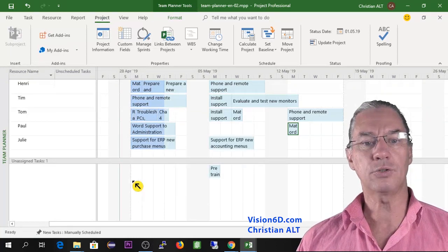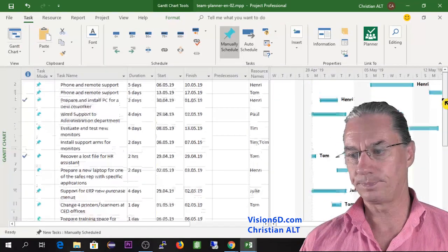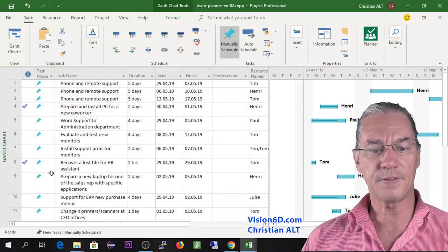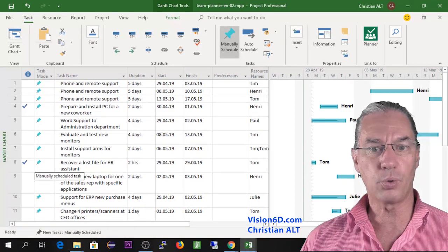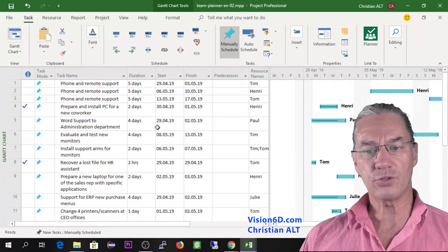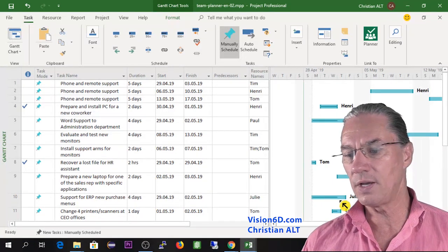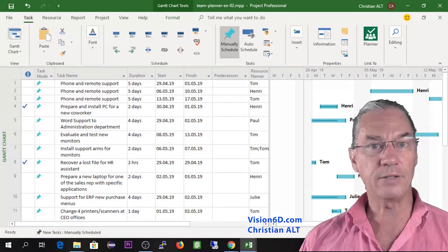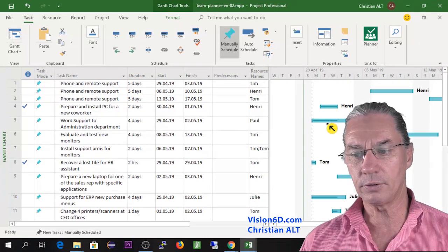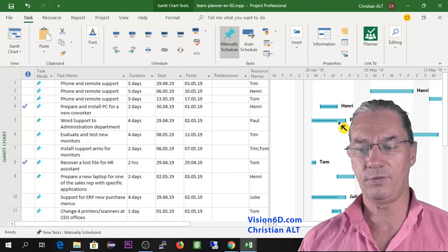We might also want to see how this looks on the Gantt chart. On the Gantt chart we see that we didn't insert information manually, but all tasks are manually scheduled — and it's important to know you have to do it that way with the planner. We see the durations, start and finish dates, and the assigned resources. The darker bars inside the task bars show the percentage completion of each task.